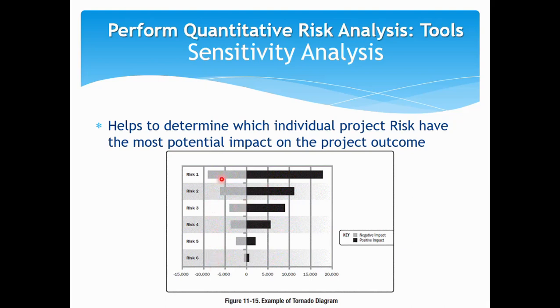So for a particular risk, there can be various outcomes. Say a certain activity is getting delayed, you foresee a risk, say a procurement, you're purchasing a hardware shipment to come to Sri Lanka. There's a risk that the shipment can come early on a positive note, and even negatively, maybe a few weeks later.